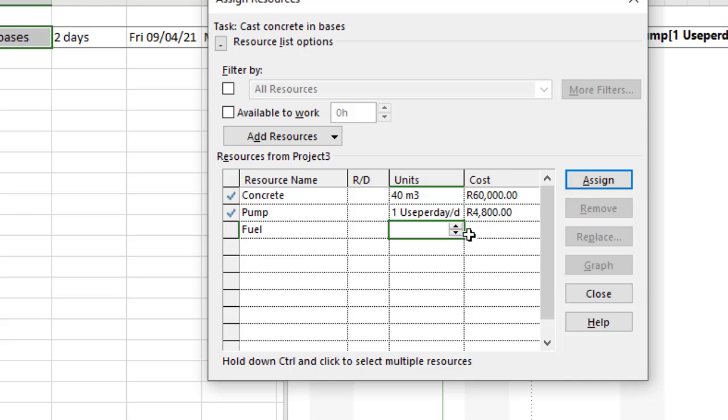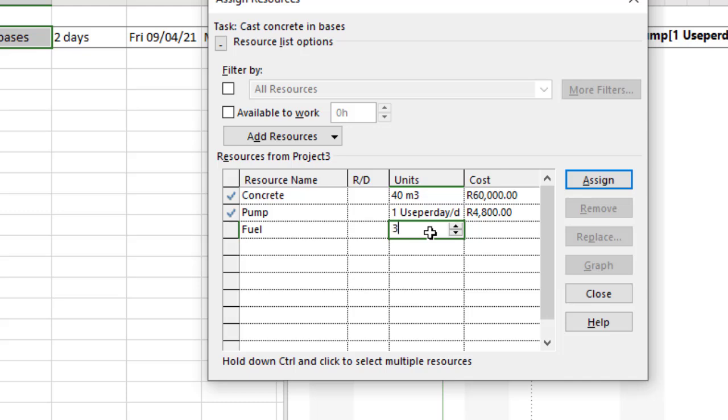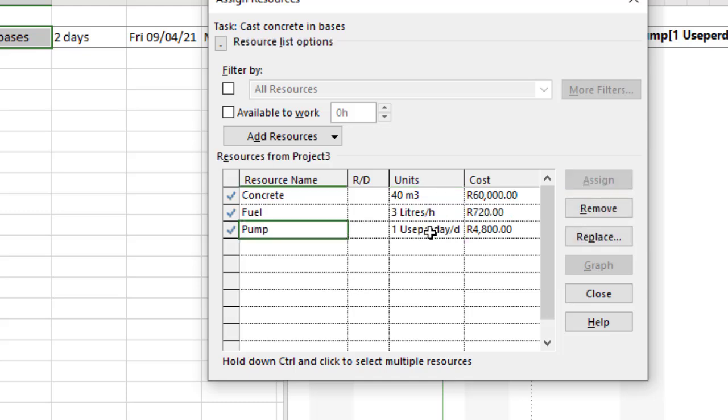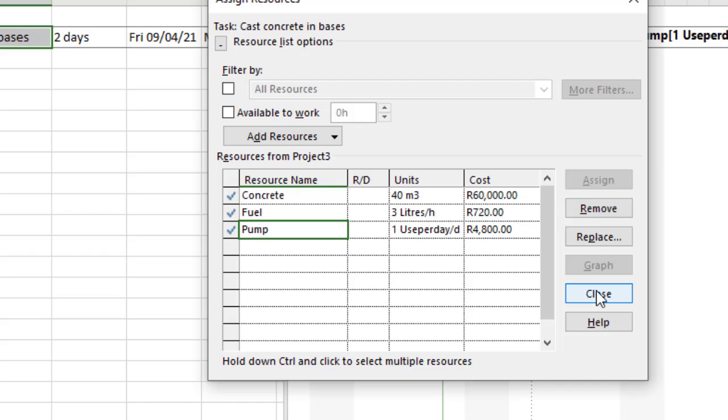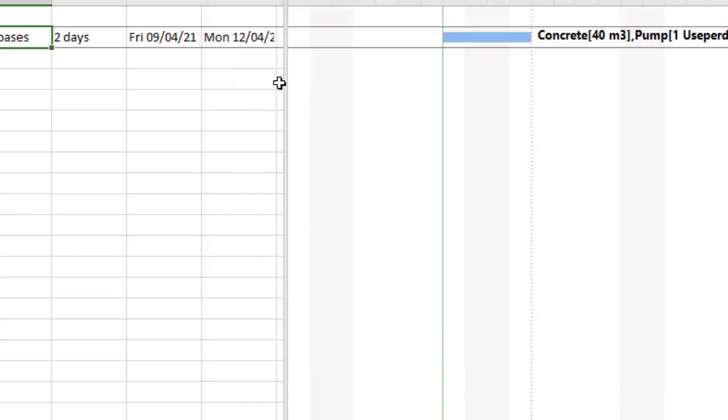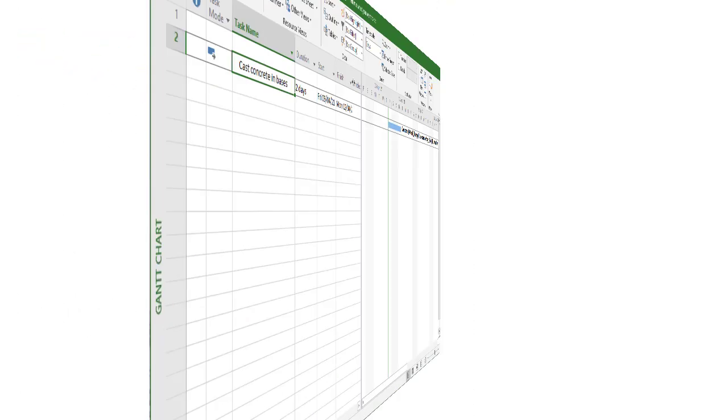On the fuel side, let's say we're going to use three liters, and again I'm going to use the per - in this case just H for hour. MS Project will recognize that. You'll see we're going to use three liters per hour. It already works it out: eight hours per day times two days, and that gives us a cost. Let's close that and open up the cost column to see what we've done.